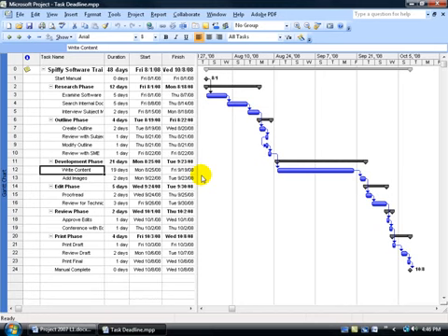And a deadline can only be applied to one task at a time. So you could start up here and apply it to that as an indicator of when this task is supposed to be completed, and then progressively move it along as you go through the tasks in your project. So this is how you apply it.